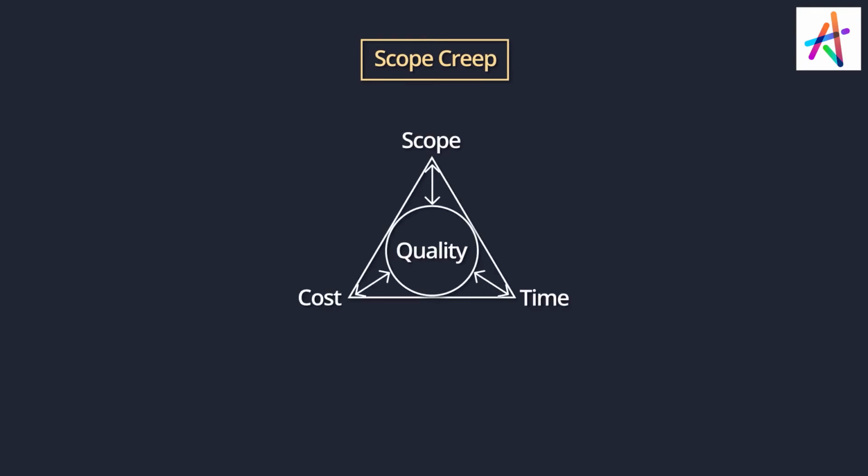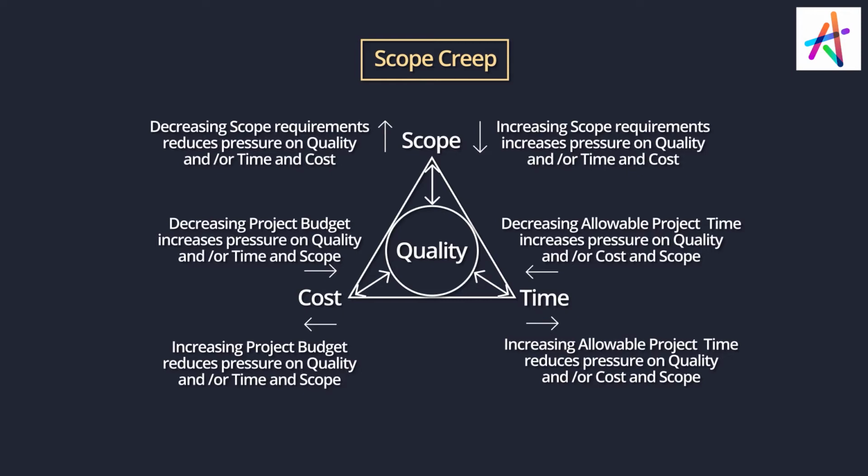PMI clearly says don't do anything more than what you have agreed upon. If you do anything more than what you have agreed upon without going through the change management process, it is called scope creep. Why is PMI against that? Scope creep, gold plating, why? Because invariably it's an iron triangle, you change it, you will squeeze the quality within. Quality will get squeezed, risk will go up because somewhere you are compromising and you might not apply all the policies and procedures, so risk might also go up.